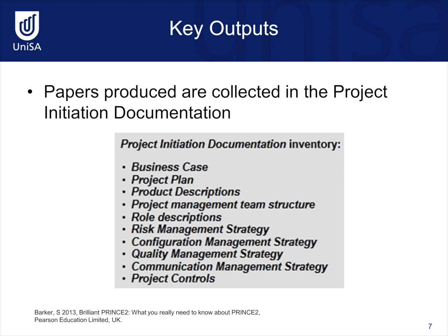So what is produced and provided in the project initiation documentation? There are a number of documents. They include the business case, the project plan, product descriptions, a project management team structure, role descriptions, 4 strategy documents, and the project controls.